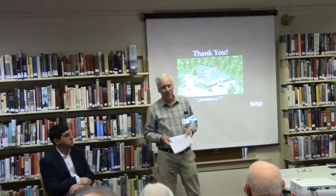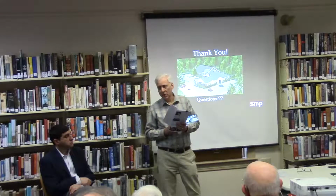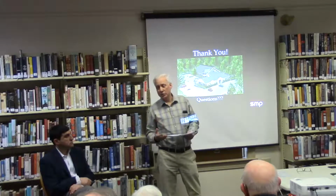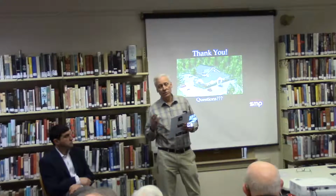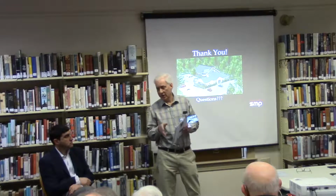If we're going to go with one of the local banks. The other question that came up was, well, how about the bond bank? Because the bond bank is out there. The problem with dealing with the bond bank is there's a lot of upfront application fees, thousands of dollars for application fees. They only sell their bonds in July and December, and they can't tell you what the rate is today.